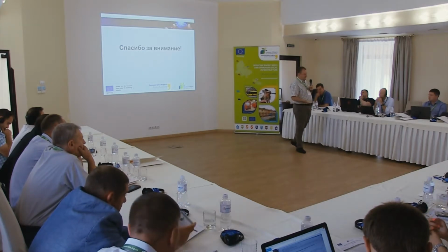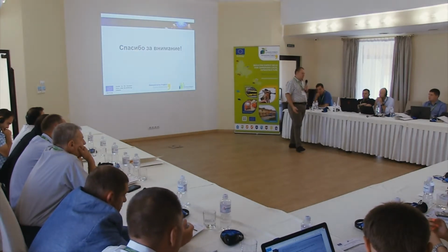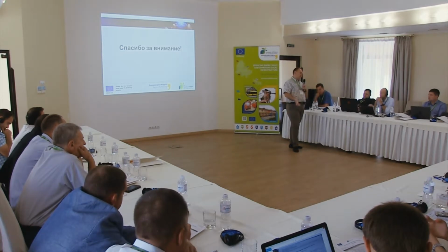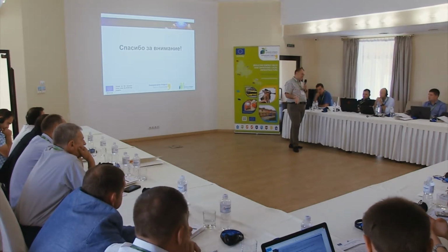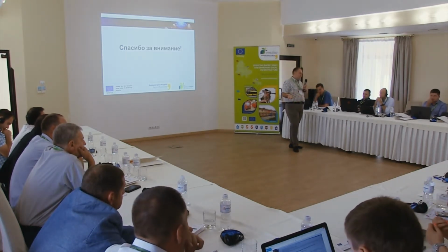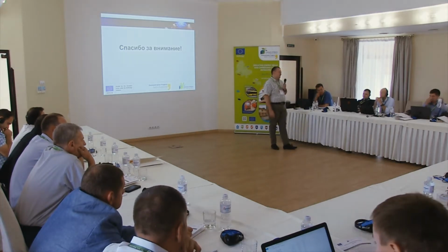But the problem is about what type of tender it is. If it is a national open tender, most probably you will need to translate all the templates into Romanian. Well, is it a problem? I think it is. Because besides the basic presentations which are available in PRAG, we also have 70 pages of general conditions. And, well, you have chosen this path, but you need to follow it.